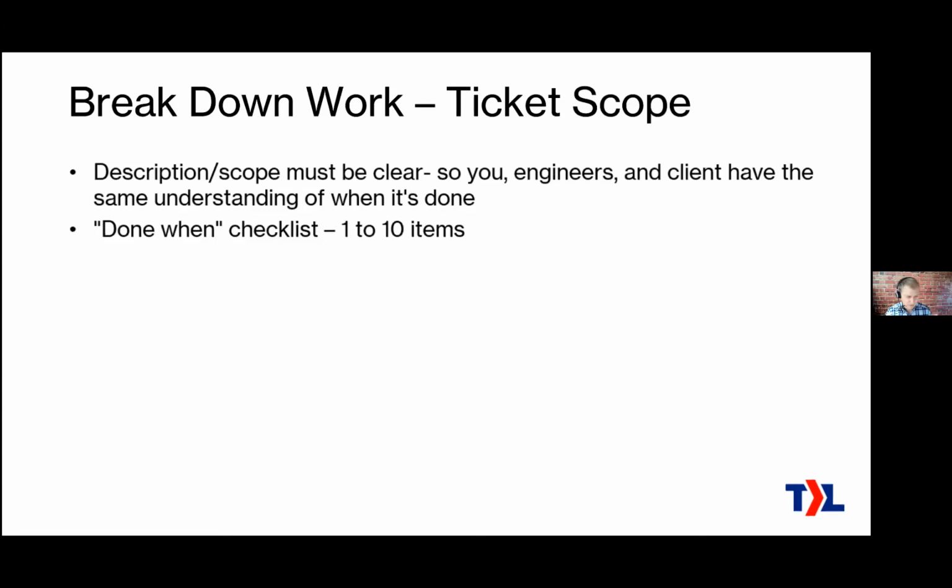If you expect this work to be done by a junior engineer, then that checklist might describe the specific steps to be done in order to consider that ticket complete. If it's something that you haven't done much before, and you expect a more senior engineer to do this, then it might just describe the outcomes, right? Because it's the senior engineer's job to figure out how to accomplish that.